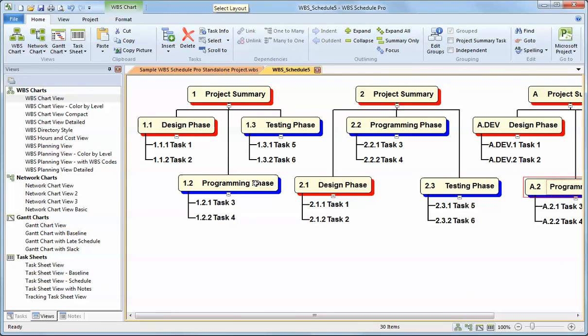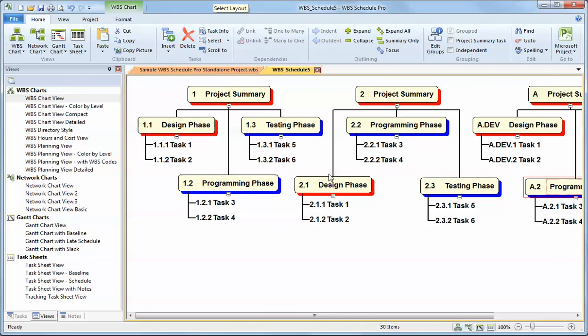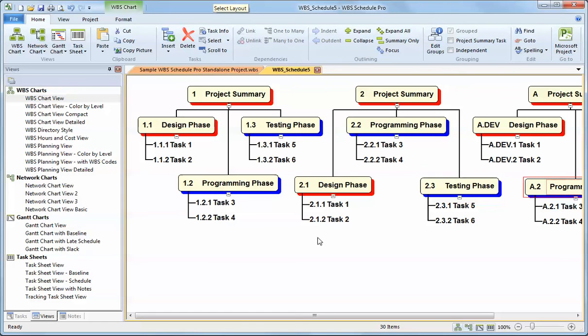The WBS chart, just like any of the views in the tool, can be transferred to the Microsoft Project program. You don't have to use Microsoft Project with WBS Schedule Pro, but you can. So I can take this WBS and whatever I've done, whatever I've scheduled here, I can transfer that to Microsoft Project. And all the dates and resources and hours and cost and structure that I've defined here will get transferred to Microsoft Project.